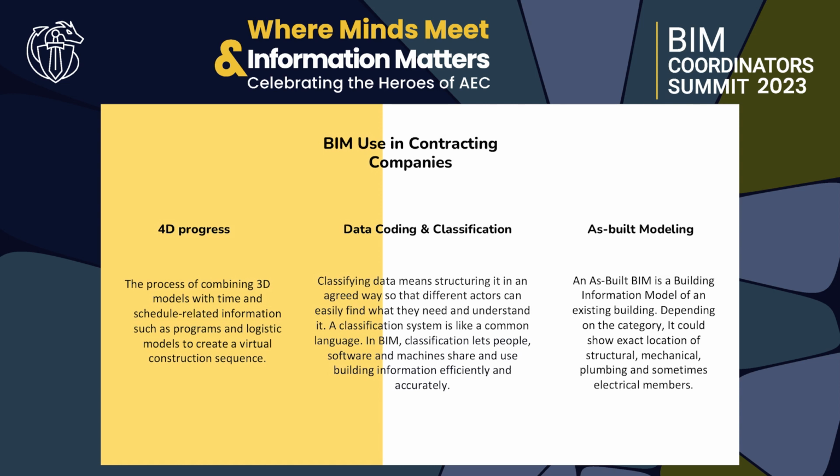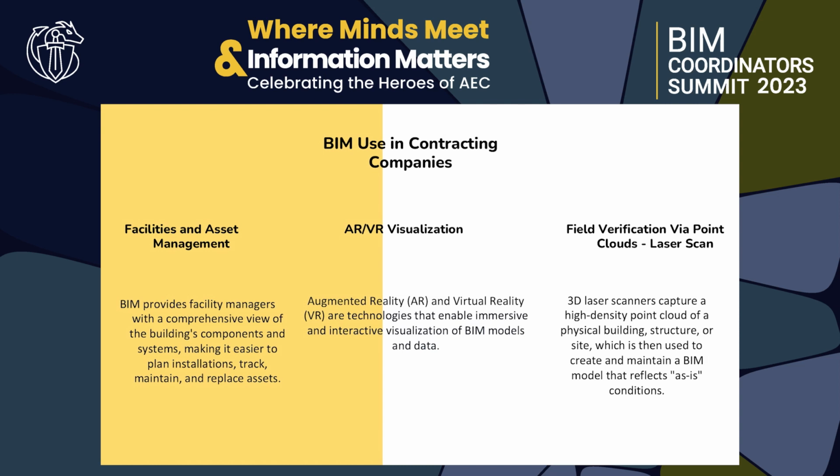Site analysis utilizes models for position, orientation, and infrastructure connections. Lastly, BIM is used for cost estimation, extracting elements from the model for quantity takeoff and cost estimation throughout the design stages. BIM used in contracting companies. 4D progress, the process of combining 3D models with time and schedule related information such as programs and logistic models to create a virtual construction sequence.